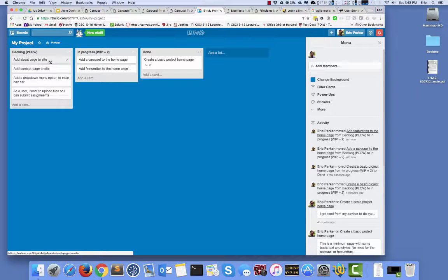And I'm deciding I'm going to take this card and move it to work in progress. And I'm thinking, because today I'm like, oh, I've got all day today, I'm going to move all these things to work in progress. That's a bad idea. And that's where our work in progress limits come into play. Because you don't know what's going to happen throughout your day. You may get interrupted, things may happen. You really want to only have things in progress that you're actually working on. So let's say today you're going to try to get to these 2 things. That's great. They can both be work in progress, and that's where our limit of 2 comes in.